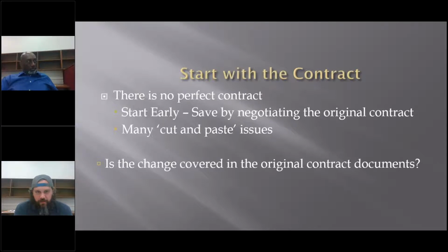And then of course, it is the change order that you're talking about. Is there a provision somewhere in the original contract documents that explains how to handle that? Like you might already have a dollar amount that's agreed on for an hourly rate or something related to that.